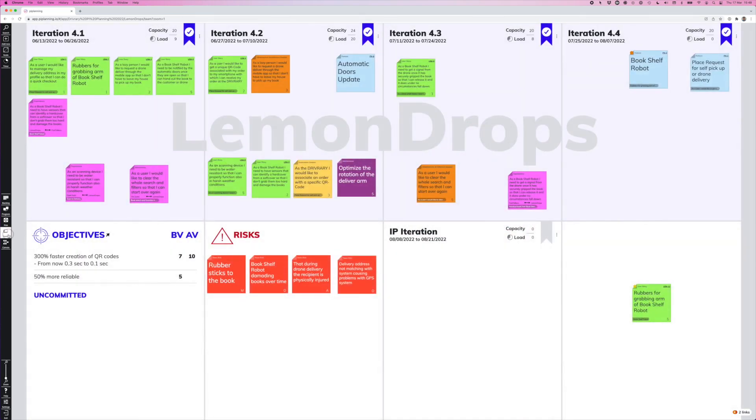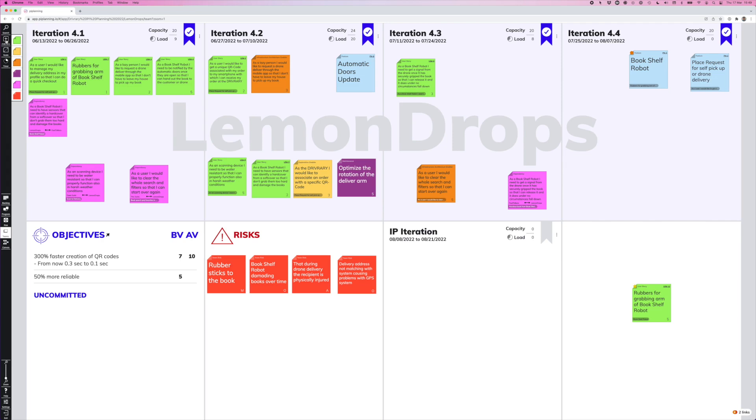Now on the team board, we want to break down this feature into user stories. And to do that, we simply create sticky notes like we are used to from physical boards. And to do that, we click on the add new button. This opens a sticky palette with all the stickies that we have available on our team board. That's the sticky types that the RTE or STE configures in the RTE cockpit. Now from the sticky palette, we can drag and drop stickies onto the board.